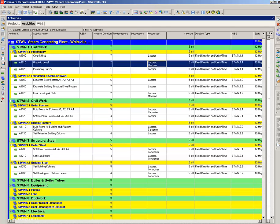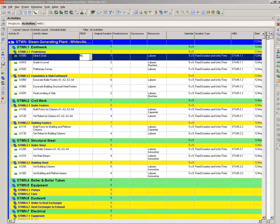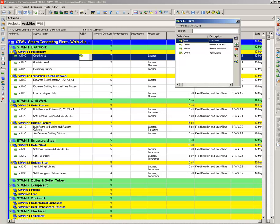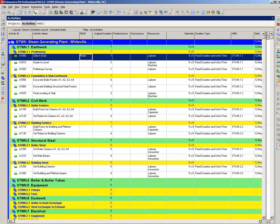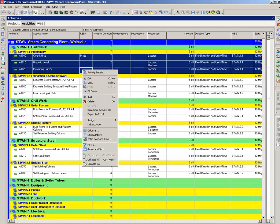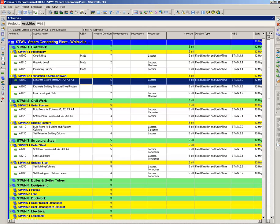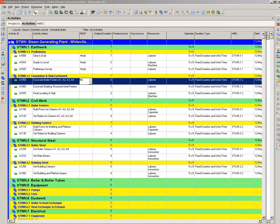So this particular little schedule is completely 100% resource loaded. Going over to the responsibility, which if you remember is from an activity code, all activity codes can be handled the same. So let's assign this to somebody. Again, the pop-up box showed up on my laptop monitor. We're going to put Renee Madison in charge here, so she's taking care of that. Now rather than do these one at a time, we can do a fill down after it's already assigned. Fill down. She's now running all the preliminary earthwork.